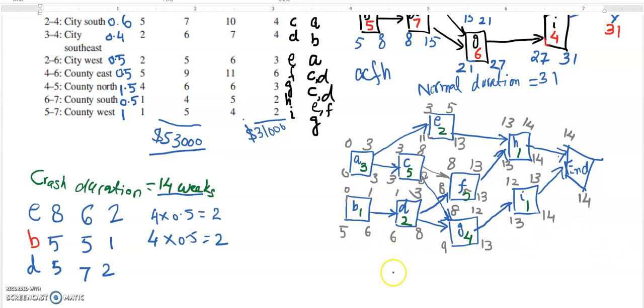So in the changed situation for D, if its earliest start time is 5, its latest start time will remain the same, because we are not going to change the duration of the project. So therefore its effective slack which is remaining is 1.